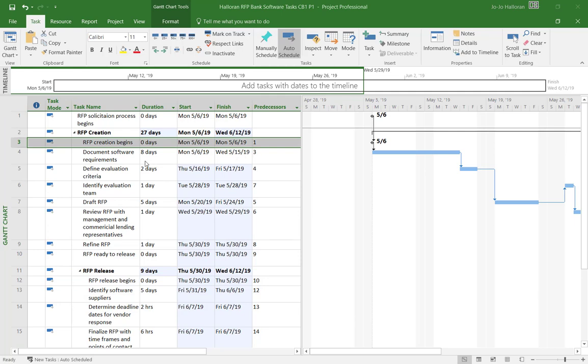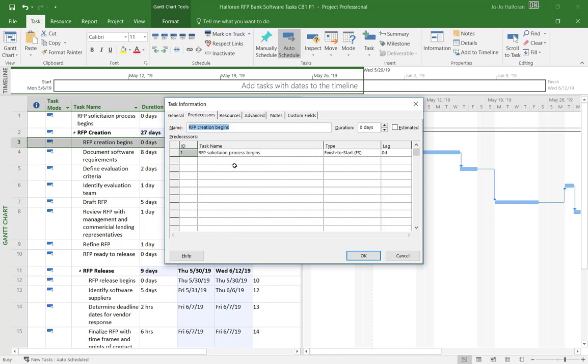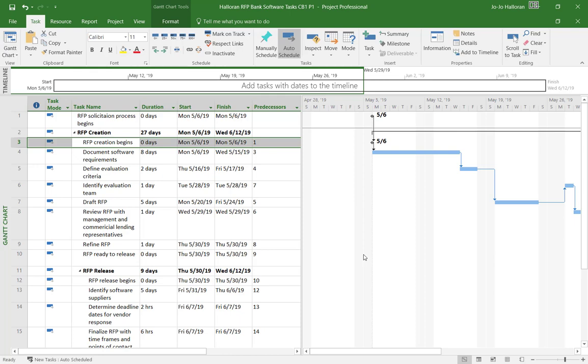And to double check that it is a finish to start, you just have your task selected and double click, and the Task Information dialog box will open. You will be on the Predecessors tab, and here is your finish to start relationship. So if you did need to change it, that's how you would go in and change it. But usually finish to start and start to start are the most commonly used. Okay, so now we're going to click Save, and this part of Project 1 is now complete, and then I will make another video for the next step.